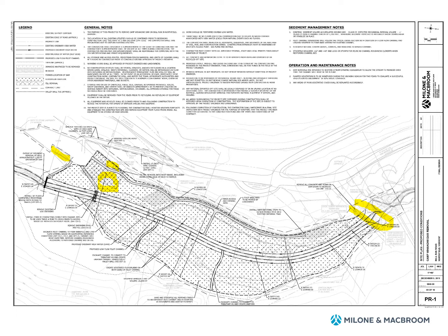As part of the project, there will be an informal bridge, as well as a rock ford, some informal steps kind of connecting existing paths in the woods, as well as existing paths through the project area. Sediment excavation and haul will be from the entire area indicated with the grass hatch. And a river pilot channel will be excavated kind of through the project area, as well as small channels connecting from the edge of the woods over to the new channel.